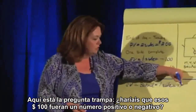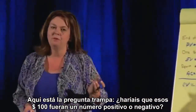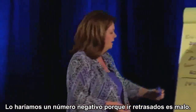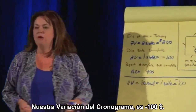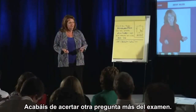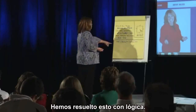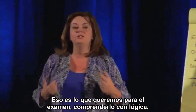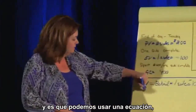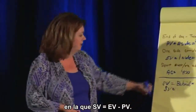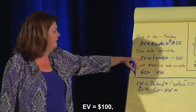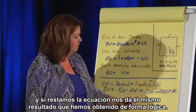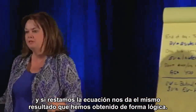Being behind schedule is bad, so we make it a negative number. Our schedule variance is negative one hundred dollars. The fallback equation is: SV = EV minus PV. EV is one hundred dollars, PV is two hundred dollars, so one hundred minus two hundred gives us negative one hundred — the same answer we got logically.